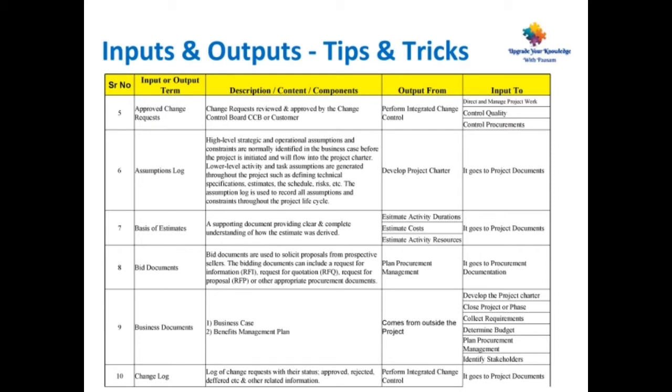Coming to point number 7, basis of estimates. A supporting document providing a clear and complete understanding of how the estimate was derived. This is the output from estimate activity durations, estimate costs, and estimate activity resources. This goes as input to various project documents.